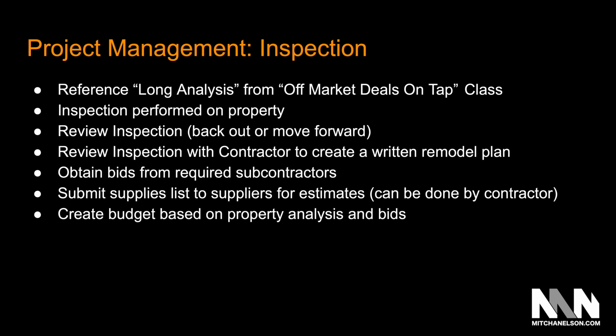The way that I like to pay contractors is only on labor. We talked about that in the picking contractors module, module 7. We talked about paying them once the milestones are done. Well, that only works if you're providing the materials for them, because otherwise you've got to pay them up front for the materials, and then we get into that risk of them just disappearing with your money.